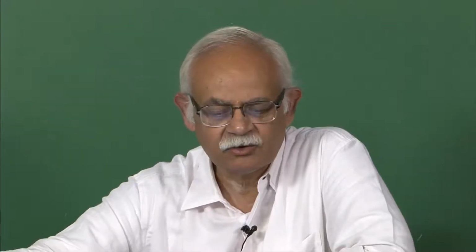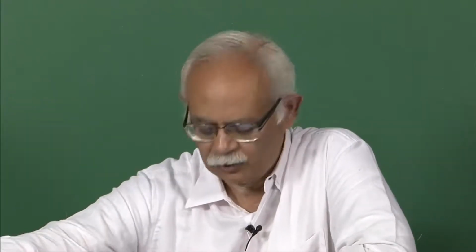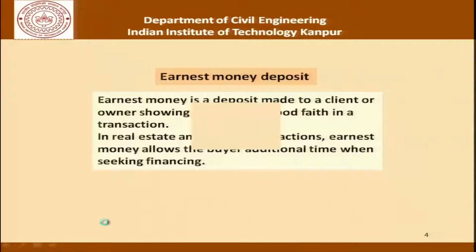maybe 10% or 5% of that, the buyer gets some additional time to arrange the additional resources, because the buyer may or may not have all the resources when he bids for the project. But the buyer is confident that if I get the project, I will be able to arrange those resources. To express his good faith and seriousness as far as the bidding is concerned, there is the earnest money deposit, which is placed with the client or the owner, and once the job is awarded to the bidder, the rest of the things follow. So that's our discussion on the earnest money deposit.